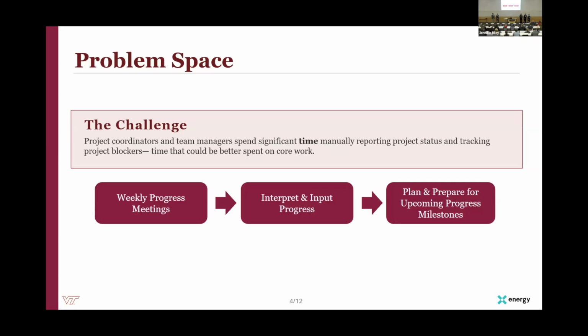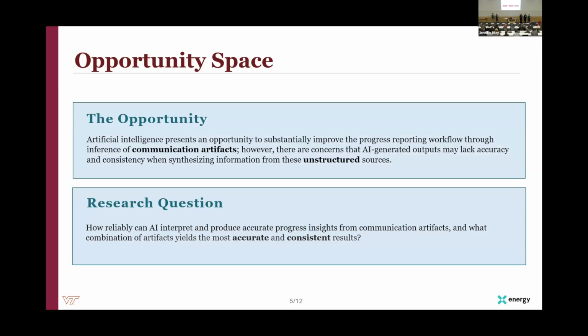However, currently employees are spending a significant amount of time just reporting their project status to the project controls team, who then interprets and inputs that information into the system, and then plans and prepares for upcoming milestones, and repeating this process as new status updates come in, resulting in a workflow that is time-intensive, repetitive, and subject to human error.